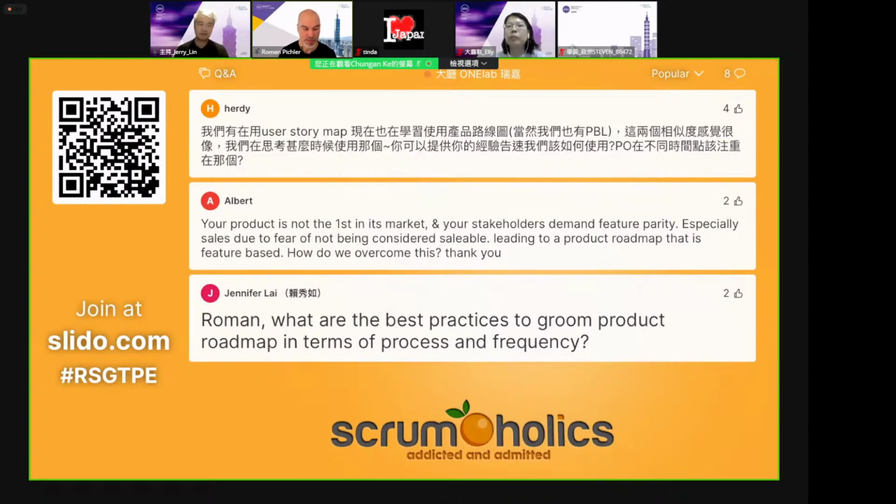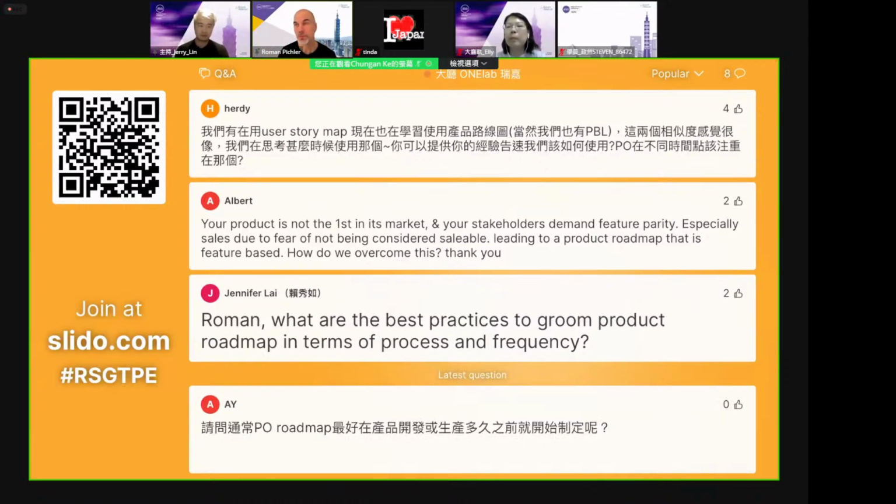And so story maps allow us to literally connect stories and describe a user journey or part of a user journey. So they can be very useful, and you can use user journeys as an alternative to a traditional linear product backlog where traditionally you have the high priority items at the top and the lower priority items at the bottom. The user stories flow from left to right, and again they try and model a user journey or part of a user journey or a user workflow.